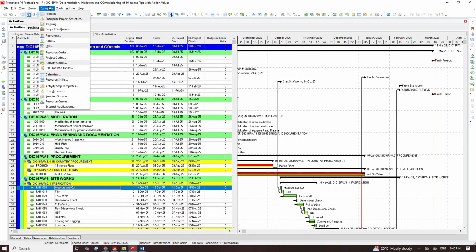But when there is a timeline and the person is the one that actually says the time, that's the same thing we said when you are resourcing. Let the people be committed to the number of resources and the time it's going to take, but you need to do some questioning and make sure it balances. If they develop a schedule and give you, you now monitor them based on their schedule. I think that's one of the key things I mentioned, that you monitor them.